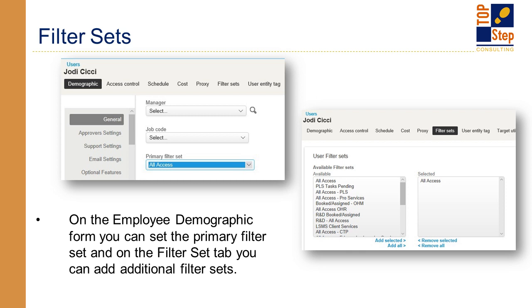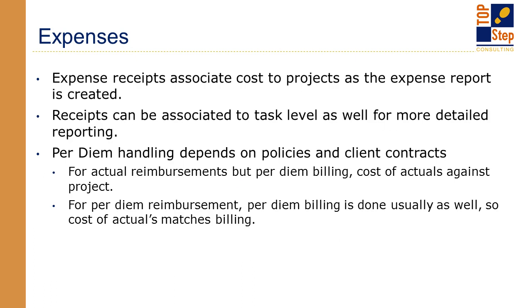Okay, expenses. Expenses can be used to generate travel expenses that are associated to projects. And as expense receipts are created in OpenAir, that cost goes against the project immediately. You can also associate receipts at a more detailed level associated to tasks.